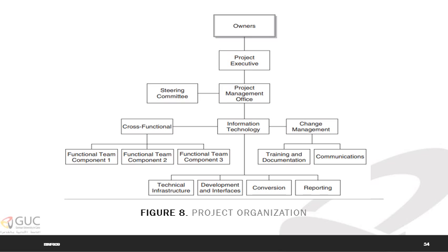A properly designed project organization chart is important to project success. A project organization chart shows where each person is placed in the project structure, where individuals located closer to the top have more authority and responsibility than members located towards the bottom. The relative location of the individuals on the chart specifies the working relationships, and the lines connecting the boxes reflect formal supervision and lines of communication between the individuals.